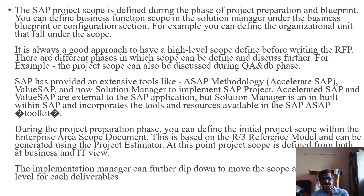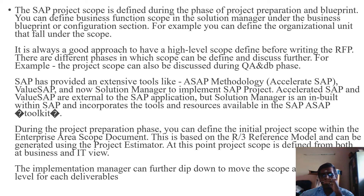Now we also have SAP Activate, which is an agile methodology for SAP S/4HANA projects. To implement any kind of SAP project, Accelerated SAP, Value SAP, or SAP Activate are external to the SAP application, but Solution Manager is built within SAP and incorporates tools and resources available in the SAP toolkit. During the project preparation phase, you can define the initial project scope within the enterprise area scope document, based on the R/3 reference model. At this point, the project scope is defined from both the IT and business level.